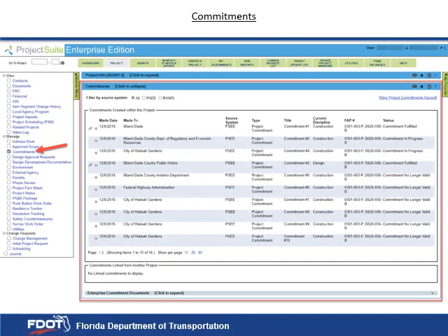Managing commitments is crucial for project managers. The Commitments module allows project managers to keep track of commitments made for their projects. It distinguishes between project commitments and environmental commitments, providing fields for essential information such as the commitment title, description, date made, due date, and the party to whom the commitment was made. Additionally, it automatically adds commitments to the global address book, ensuring comprehensive project communication.